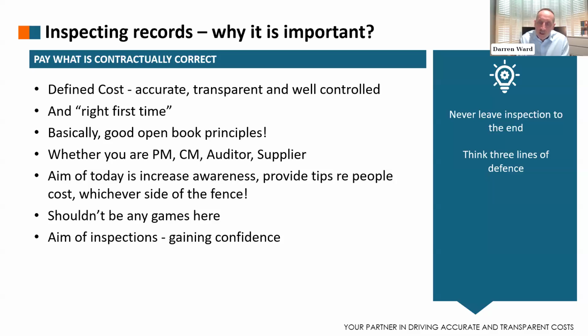So what you'd like to see is that the contractor, when it produces the application for payment, self-disallows that cost element. It takes it out of its ledgers and doesn't apply for it in the application for payment. So line of defense one is having that contractor doing robust process and control management of all its costs to get an accurate AFP.